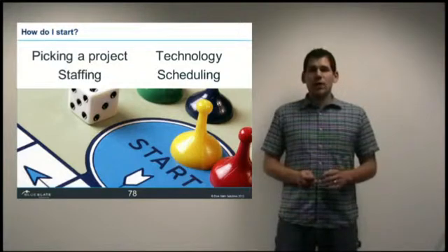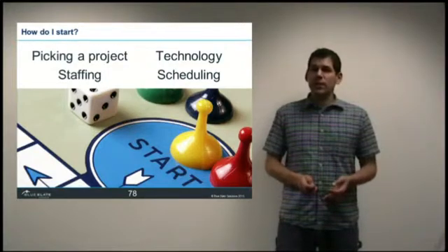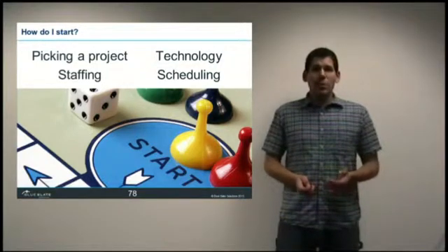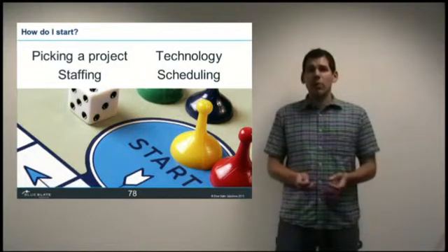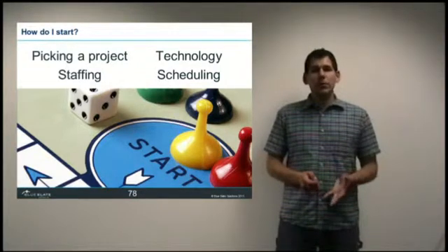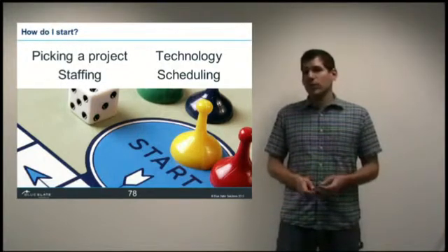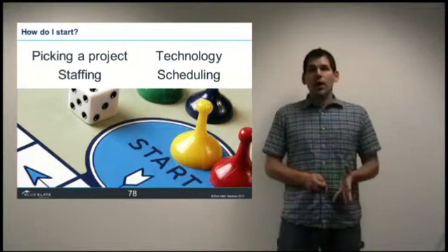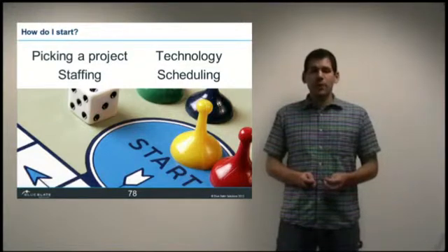You're also going to have to make decisions on being schedule tolerant. You need to understand that when you adopt a new technology like this, you're probably going to experience some schedule slip. Software often experiences schedule slip, but introducing something fundamentally different like this can exacerbate that problem. It's sort of like when we made the leap from procedural programming to object-oriented. There were a lot of developers that really struggled to make that adaptation. Similarly, I would expect there will be some struggle going from relational technologies, or even NoSQL technologies, to this newer semantic structure, or even lack of structure, if you will, that really fundamentally changes the way you need to think about problems and address them.